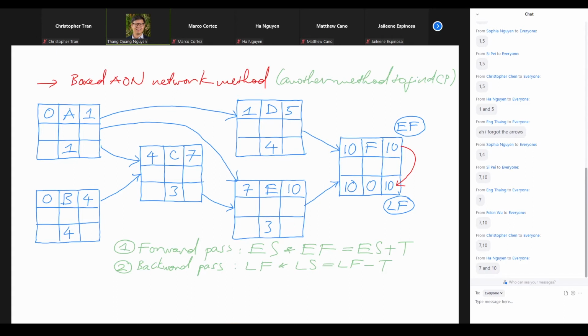So the number down here should be 10, so that we don't have any time conflict between that number and that number. This number can be 9, can be 8, can be 7, because they don't have any time conflict with that 10. But here we try to find the latest date. So as the latest, we hit exactly 10 in this value.